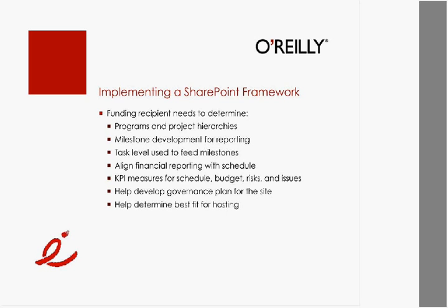You have to determine milestones for reporting. Certainly at the highest level, for example, at the federal level, I'm sure they won't be interested in the lowest level detail that you would report on. So how would you develop your milestones? For example, it could be as simple as Phase 1 design of the bridge completed, Phase 2 design of the bridge completed, Phase 1 of the foundation building completed. So what are some of these milestones that you would want to use?